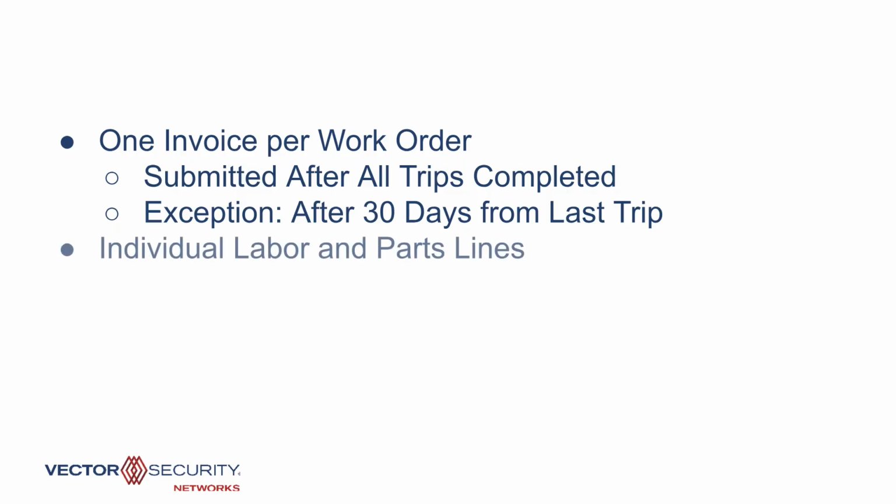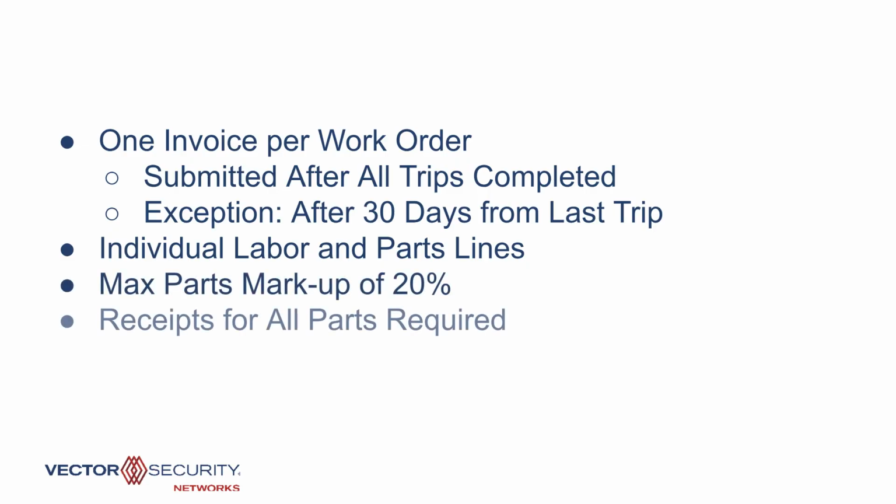Labor and parts must be broken out into individual lines. For parts, you are allowed a maximum markup of 20%, and you must provide a receipt for everything listed.